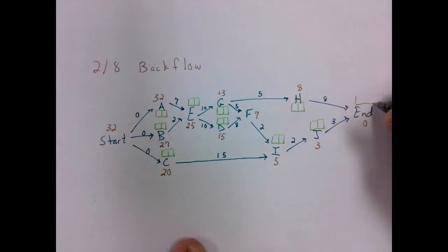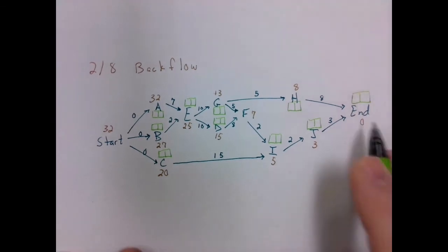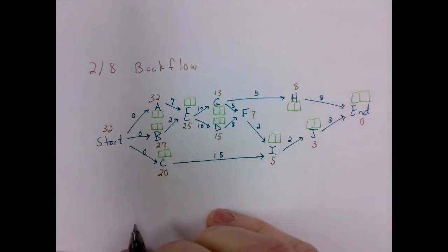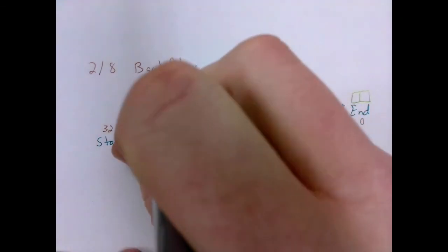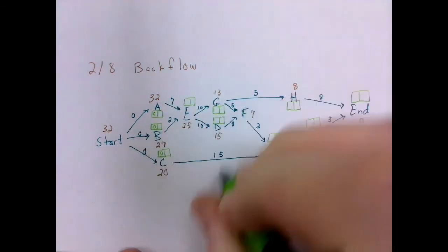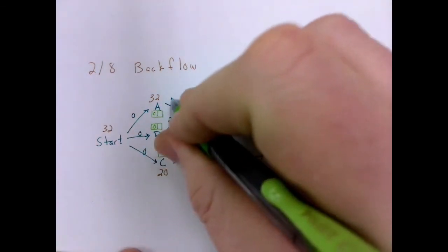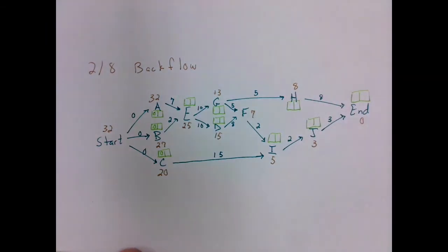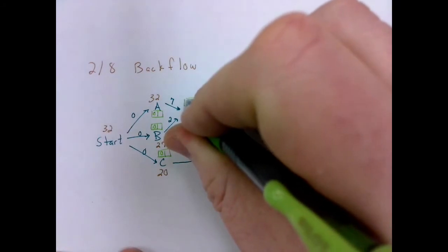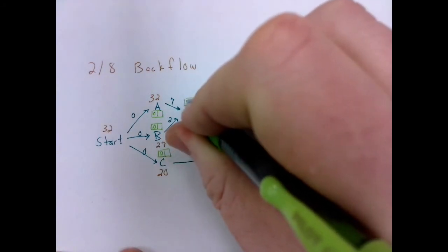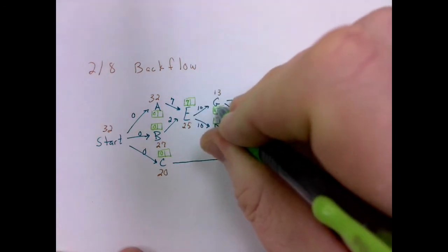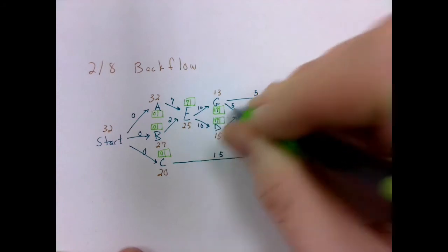So here, similar idea. We just saw backflow works from right to left. Critical path analysis is going to go left to right and then right to left, okay? So here we know that each of these can start immediately from start time plus 0, 0, and 0. Now here, task E, I've got 0 plus 7 or 0 plus 2. Remember, I have to take the higher of the 2 numbers as I work to the right with critical path analysis. So 0 plus 7 here is higher, so this will be 7 in this box. Now I've got 7 plus 10 on both of these. This will be 17. This will be 17.